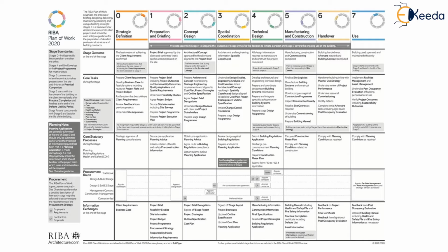He states his quality and spatial requirements as well as undertakes feasibility studies, various project management plans, and project execution methodology is also devised. The concept design stage aims to prepare architectural conceptual designs as well as it outlines the cost plan and the project strategies.